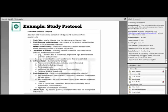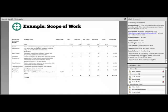I'll tell you what. Take a look at the scope of work. You see a table there where we have all of the different data sources and the different activities detailed. Look at that cost and task table in the scope of work. I think, for example, we could make some changes here. We could skip the lab observations. If you could provide us with documentation that all the purchases have gone through and maybe send us digital pictures of how it's all come together, would that work? Okay, good. Oh, yeah, we can. So you'll save a bunch of money there, not having us on site for that. We'll look at doing that.